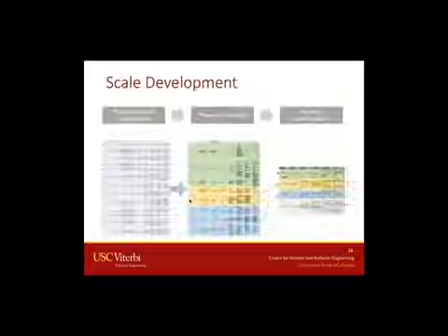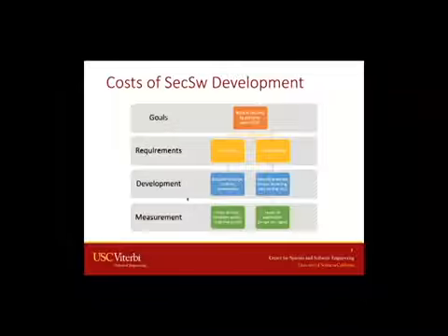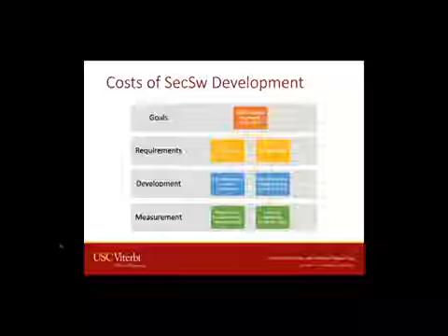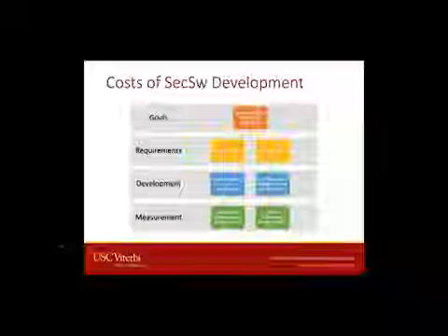Yeah, so these are the two aspects that we try to analyze here. When we discuss software security, some people talk about security functional requirements, like the controls we see in the Common Criteria, for example, when we build components for authentication, cryptography, auditing. These controls that are implemented by the developers increase the software size.